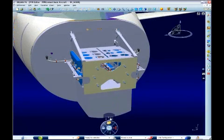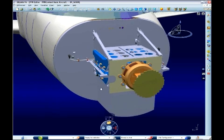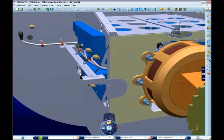Operation sequencing is now reviewed by the planner using 3D verification to validate the feasibility of the work plan. For each operation, the parts assigned to it are displayed.